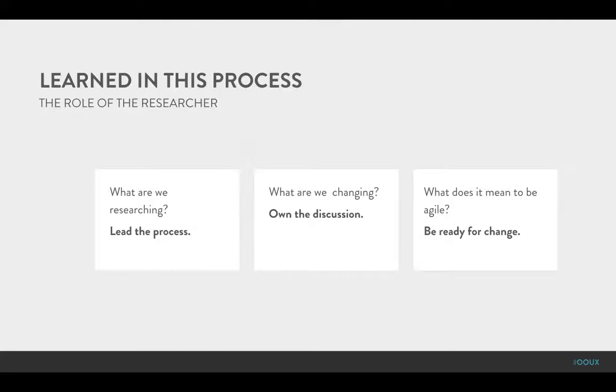So in the example that I just walked through for that particular project, during one of those usability testing sprints, the design team was making some changes to the design the night before testing. So that meant that we had to change our prototype a little bit, so that impacted development. And then very early the next morning, I had to change my protocol because the designs that I thought we were testing had changed. So you have to be prepared and ready to change at a moment's notice.